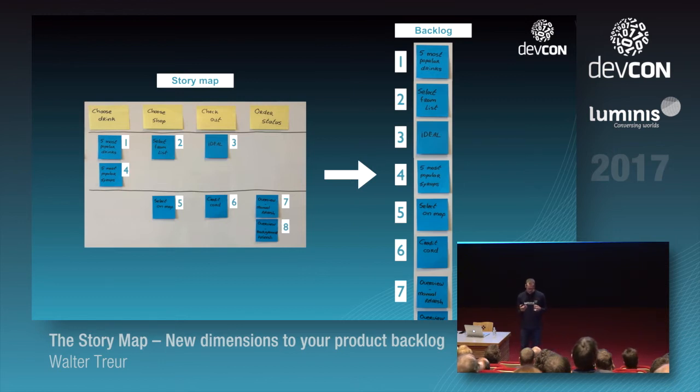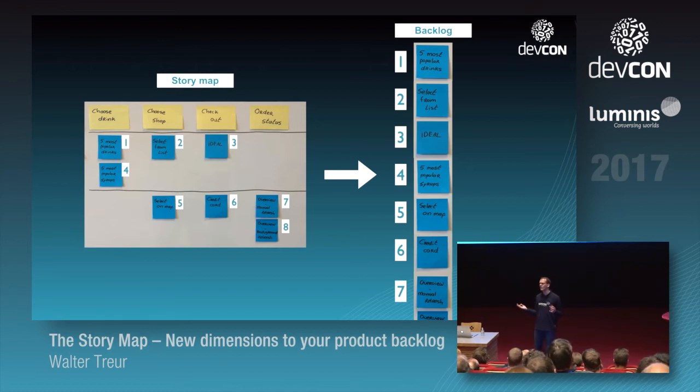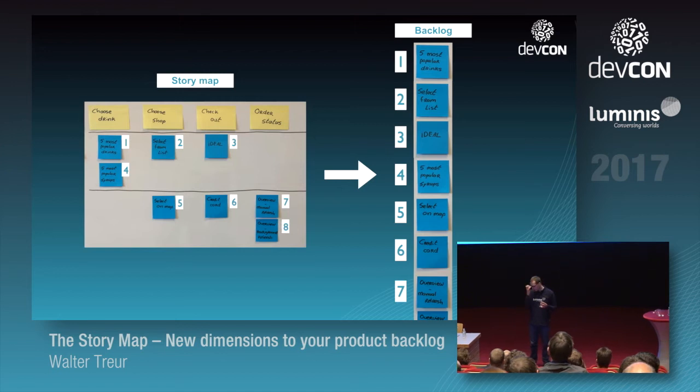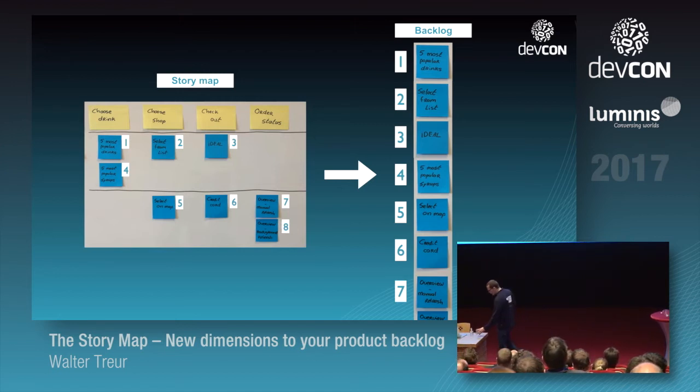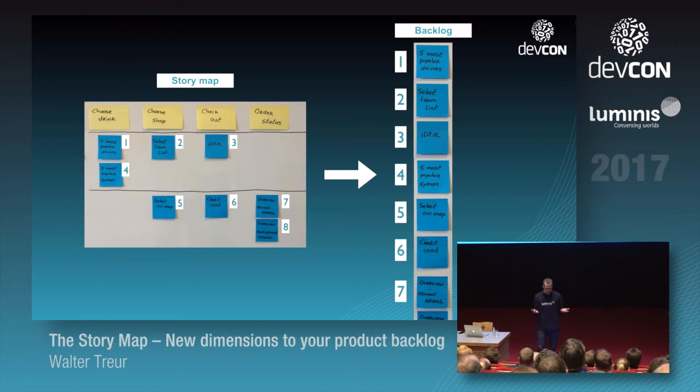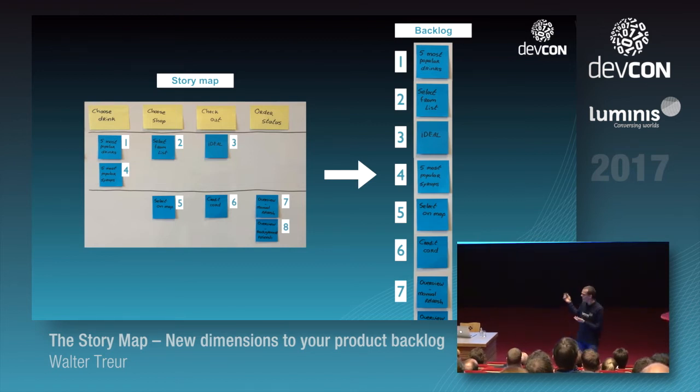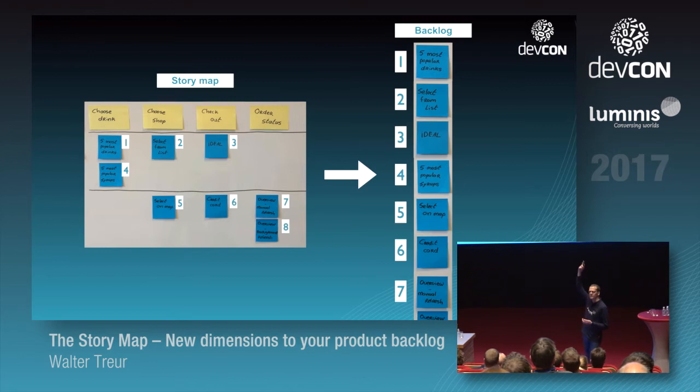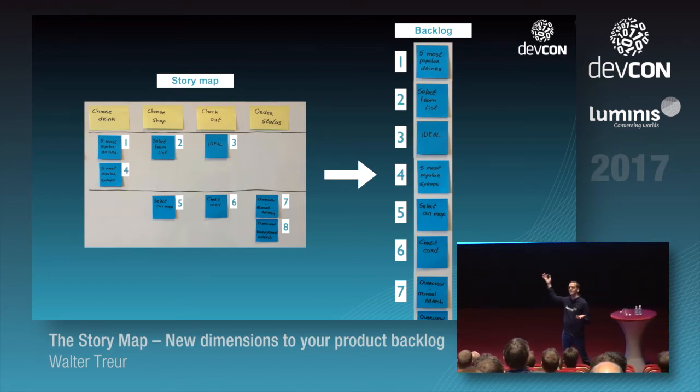So it is also something that your development team might not have a lot of experience with. So you might want to say, I don't want to start with selecting your next coffee. I want to start with the Bitcoin payment because that's more risky, that's more extensive for us, we don't have a lot of know-how. And this is where your advantage of your user story map comes into play, because you can still start with, well, let's pick the number 3 one up there and put it on the top. You can still start implementing that.